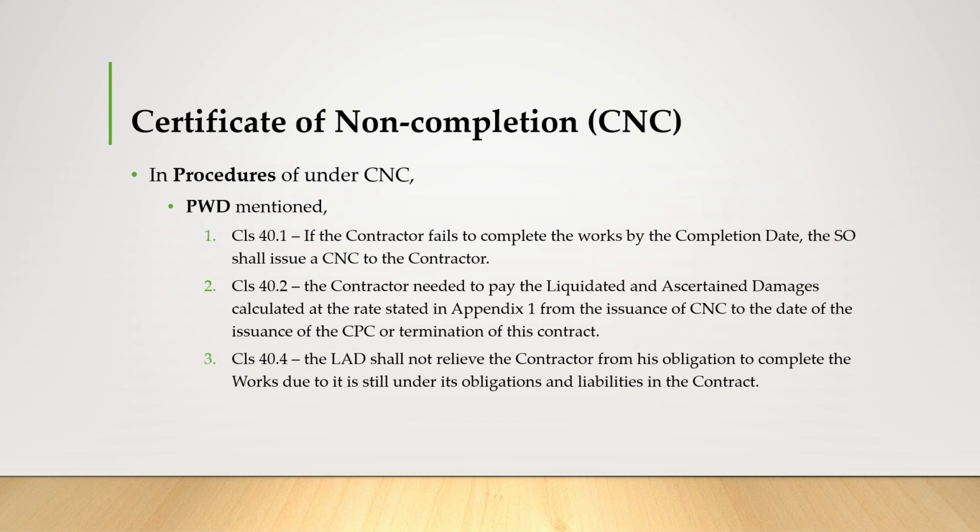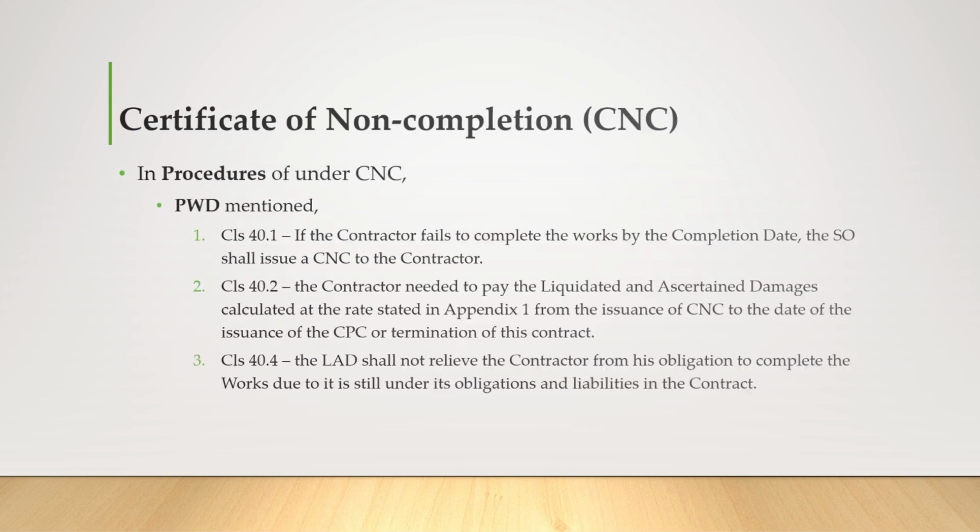In clause 40.2, the contractor needs to pay the LAD calculated at the rate stated in the appendix 1 from the issuance of CNC to the date of the issuance of the CPC or termination of this contract. So thirdly, the last one, in clause 40.4, the LAD shall not relieve the contractor from his obligation to complete the works, as he is still under the obligations and liabilities in the contract.